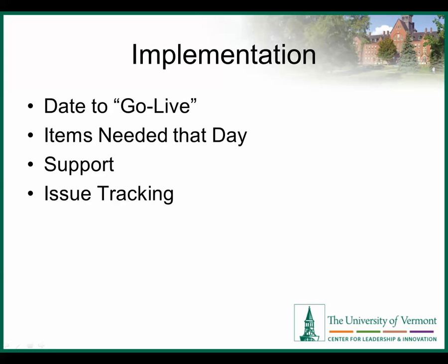Implementation, making sure that you have a date to go live, any items that are needed that day, and a list of key items that either need to be moved into the system or turned on. Making sure that you support that end user that's on the floor using that new system, and then make sure there's a way of tracking any issues that should arise.